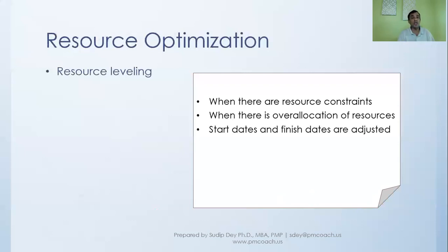And when you do a resource leveling, we'll take an example. When you do a resource leveling, one of the things that needs to be remembered is, in resource leveling, we can adjust the start and finish dates. That's allowed.